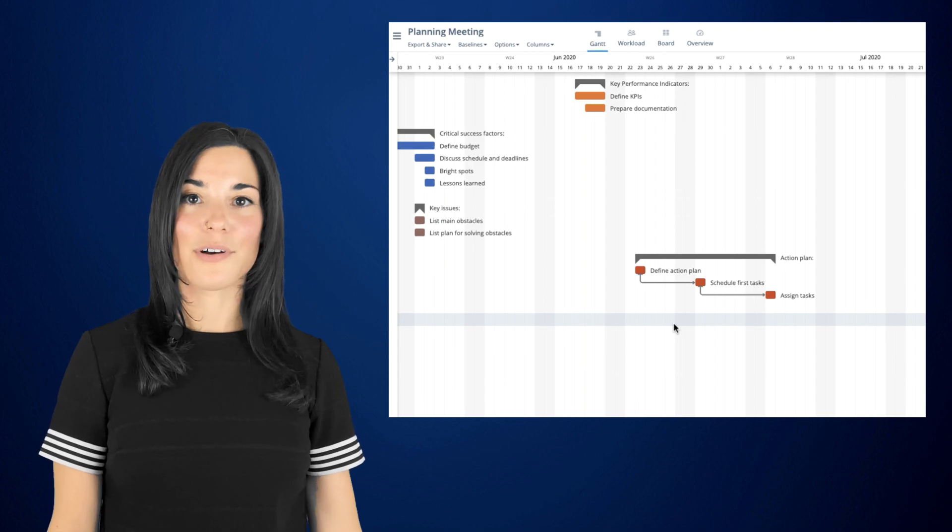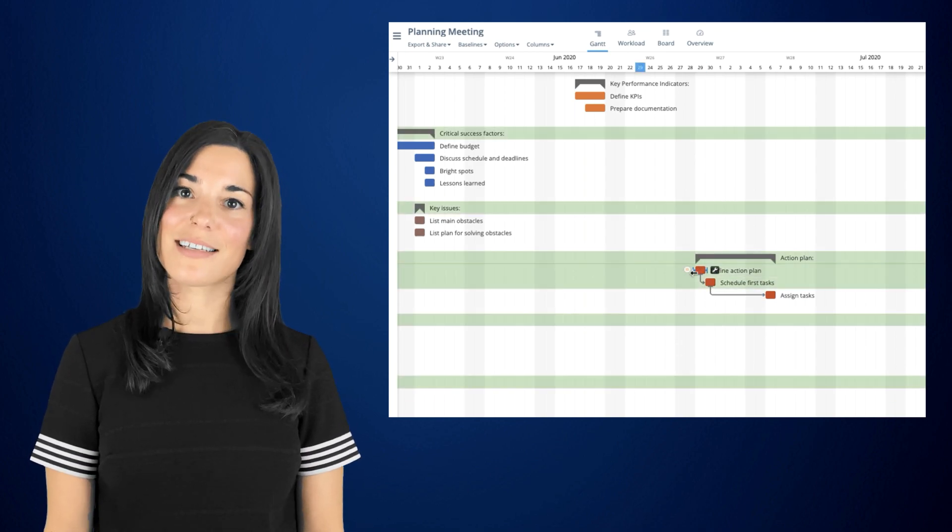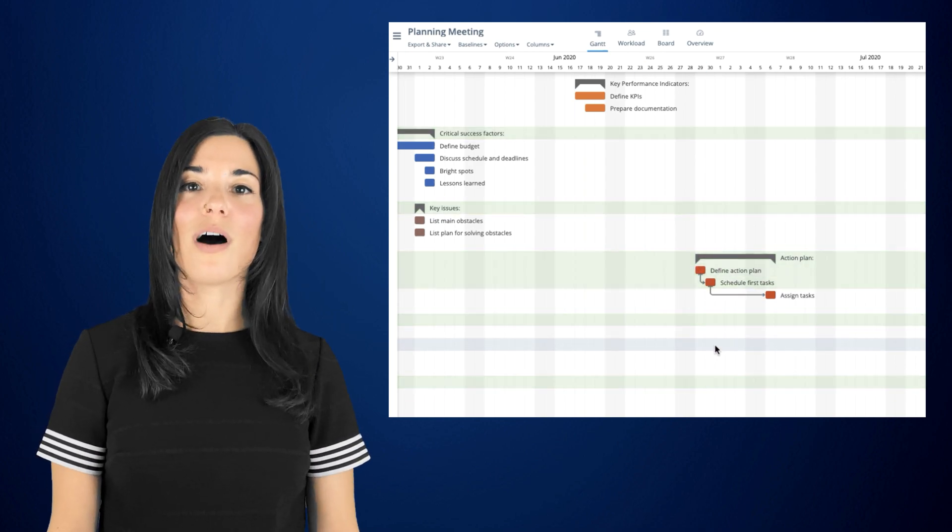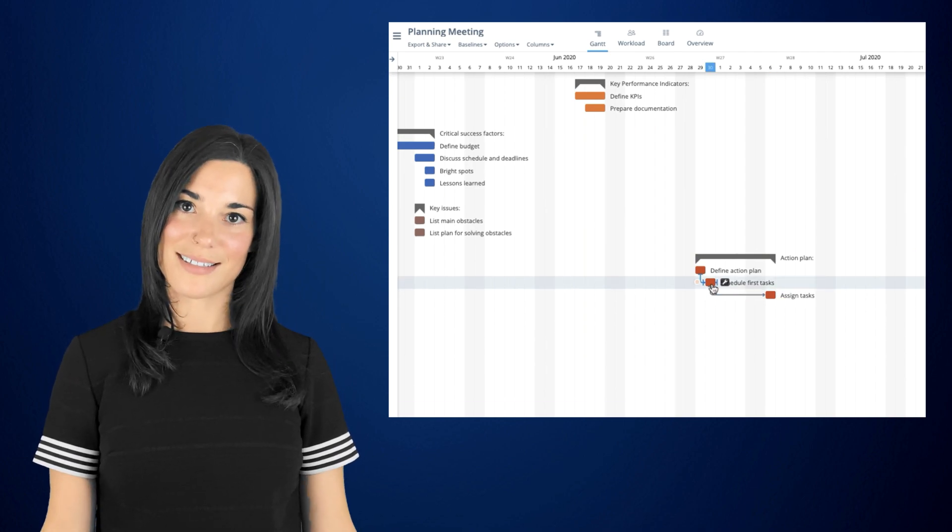However, if your due date reaches the start date of the successor task, a gap will automatically be created between tasks.